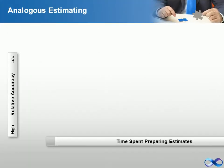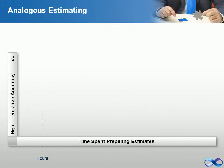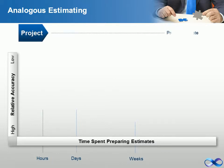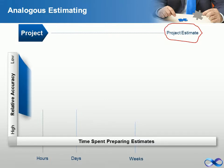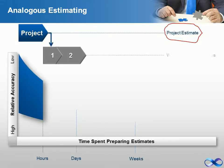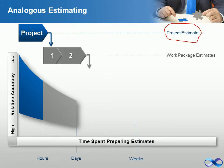Analogous estimating uses a similar past project to estimate the duration or cost of your current project — thus the root of the word, analogy. It is used when there is limited information regarding your current project. An analogous estimate is considered top-down, and is generally not as accurate as other estimating techniques.